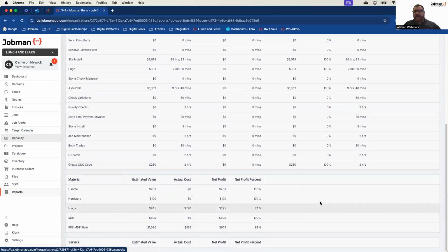We then take it down another 2 layers as well. Rather than just look at materials as an expense, we can also drill into them by category. So if we lost a heap of money on this job, or we didn't make as much profit as we expected, what was the reason? Oh, we can see the materials are red on the main report. Okay, so what about the materials actually caused the issue? And you can break this down one layer further and even break it down by category. And we can say, well, the issue here was we've been all right because we've been able to use stock for most of these items.